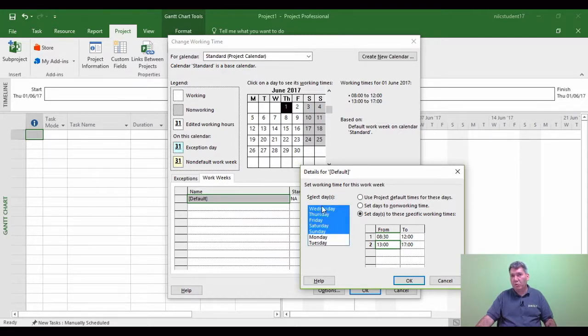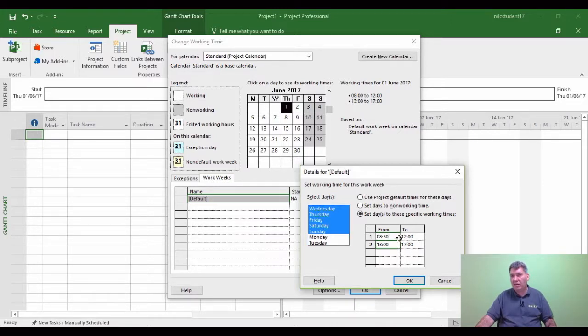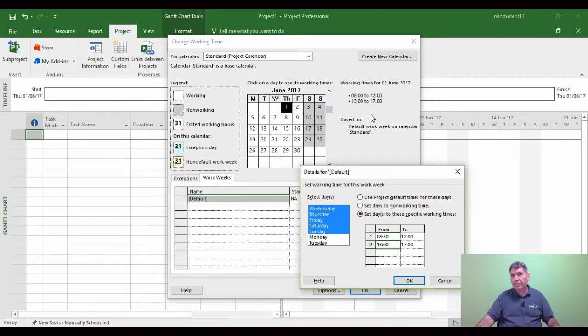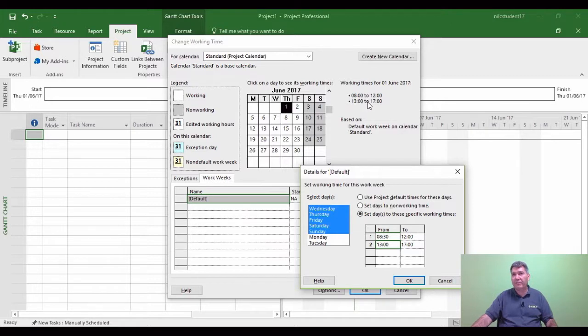So I know the working week is about to change, Wednesday to a Sunday, and all the hours are now going to change according to my new settings. But before I click OK, if we look at what the settings are at present, I can now see it's working 8 to 12 and 1 to 5.